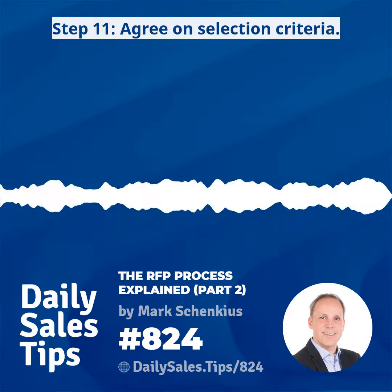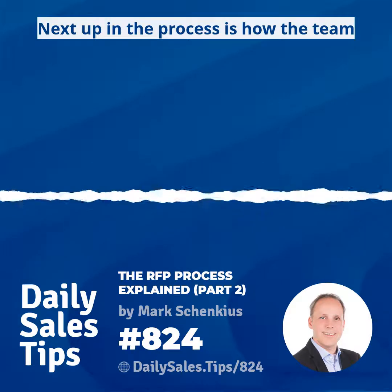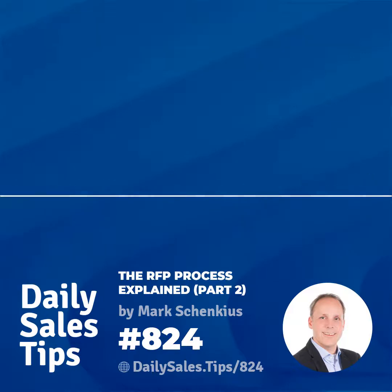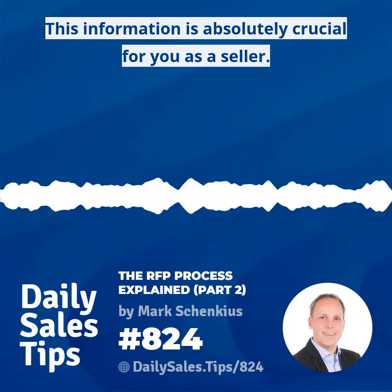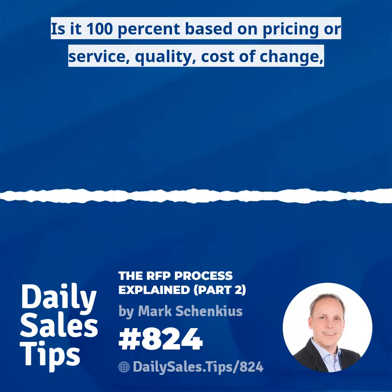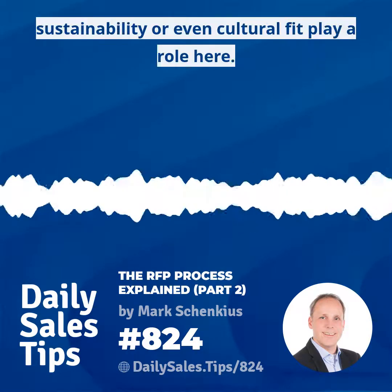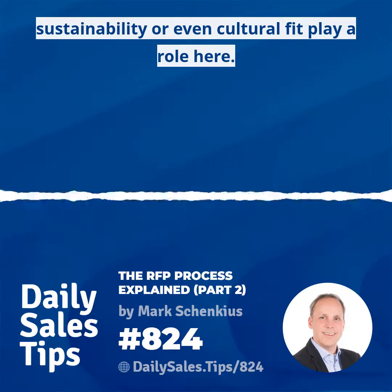Step 11. Agree on selection criteria. Next up in the process is how the team decides on what basis they will make the final decision. This information is absolutely crucial for you as a seller. Is it 100% based on pricing? Or do service, quality, cost of change, sustainability, or even cultural fit play a role here?